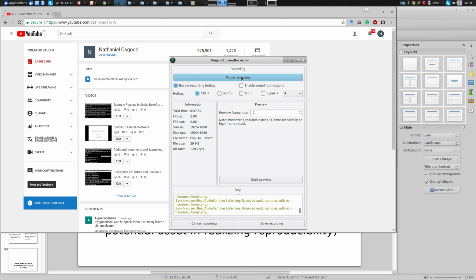Now you have to be cautious, and in some previous classes I talked about this, because it's not necessarily a linear trade-off amongst these three. For example, in software, time and money often go pretty much together. Why? Because of the cost of the developers to actually implement. Generally speaking, the big costs in software are human costs.